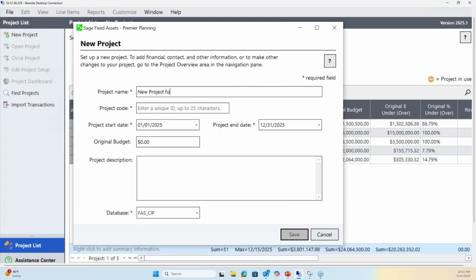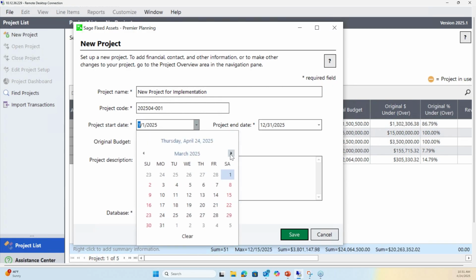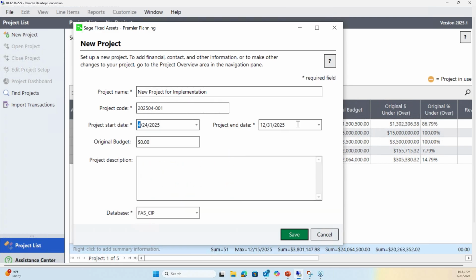This is also where I can test out transactions. When you get everything in there and then you want to test out bringing transactions in from AP or PO afterwards, my suggestion is to test out one project and one pending line item first to get the feel for it. It's easier to clean up and delete, right, if we do that. So that's always why I suggest, just go baby steps, right? So test out one import of transactions after you get everything done, and then move it to the pending line item in one project, just so you can get the feel for it, start moving it around. If you messed up, you can clean it up real easily and do it again until you get comfortable.